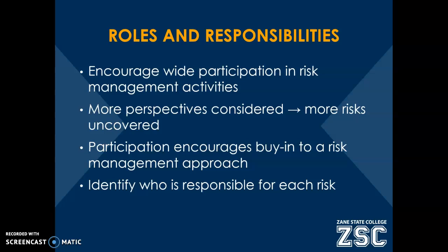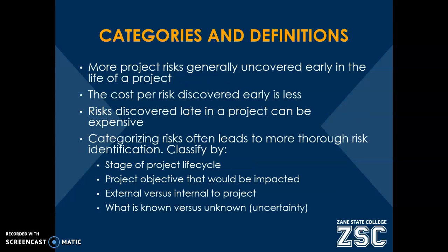Another thing is, even though you may have a lot of people working together to identify risks, you want to make sure that the responsibility for dealing with that risk is assigned to just one person. And it's important not to assign it to multiple people, because when you assign a task to multiple people, then you have the potential issue of finger pointing and people saying, well, it wasn't my fault. This other person was supposed to deal with it. So you want to make sure that you have a clear individual assigned to each risk, and only one person is assigned to each risk.